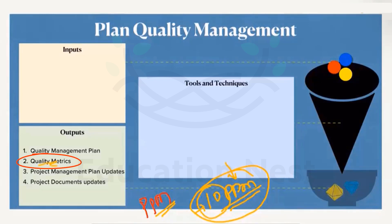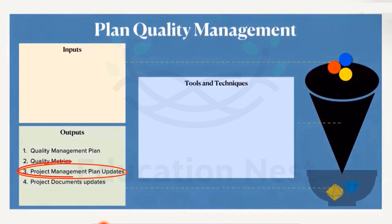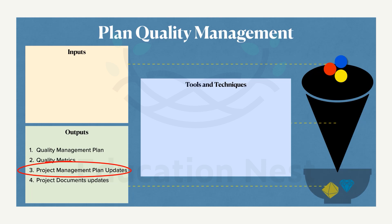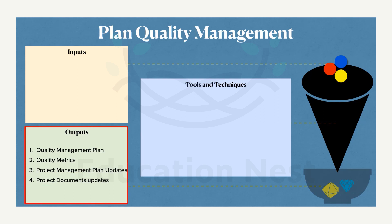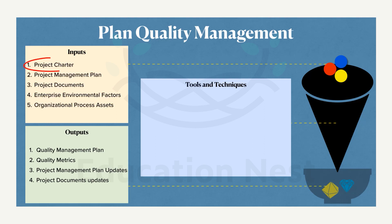The next output is project management plan updates. The risk management plan can be updated, and the scope baseline can be updated. Different project documents also get updated — lessons learned can be updated, the requirements traceability matrix can be updated, the risk register can be updated, and even the stakeholders register can be updated. All these are outputs after we finish the Plan Quality Management process.